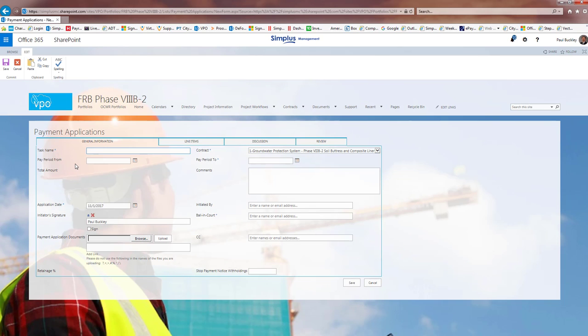And in this window, you will put the name of the project or the number of the specific project. In this case, it's P729- and then the number of the payment application. In this case, it's 11. And this is for October 2017. And this is the pay period. Actually, I'm sorry, this is for September. And the pay period, this will be from September 1 through September 30th.